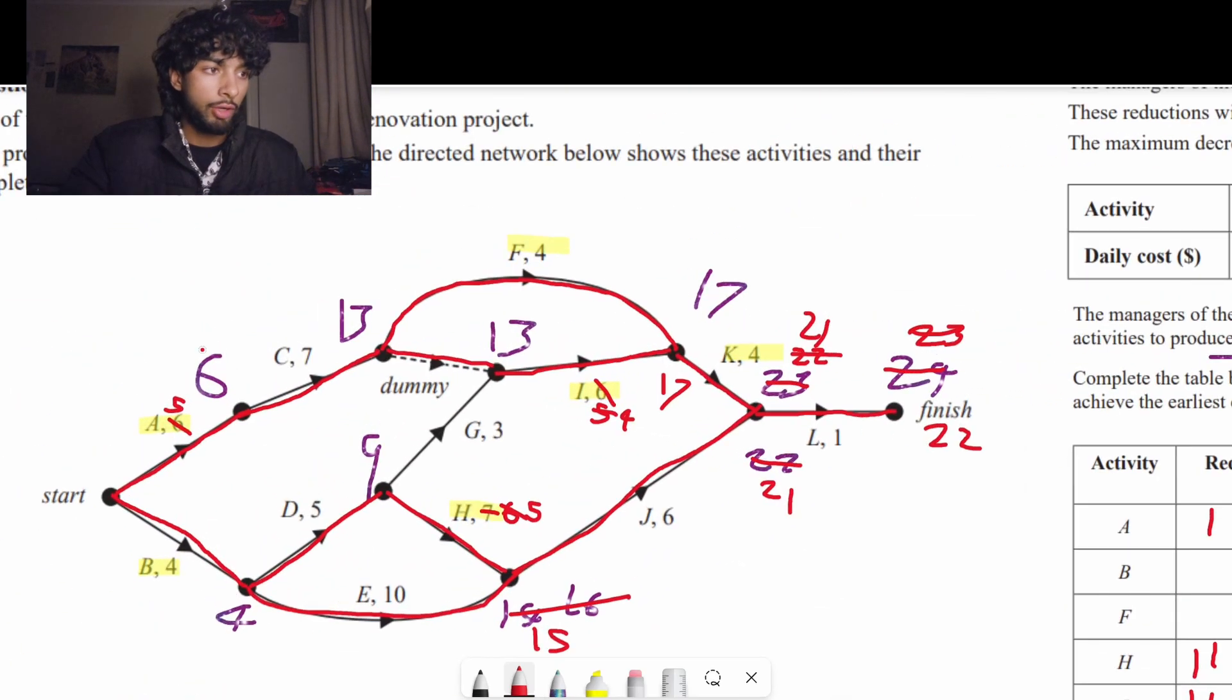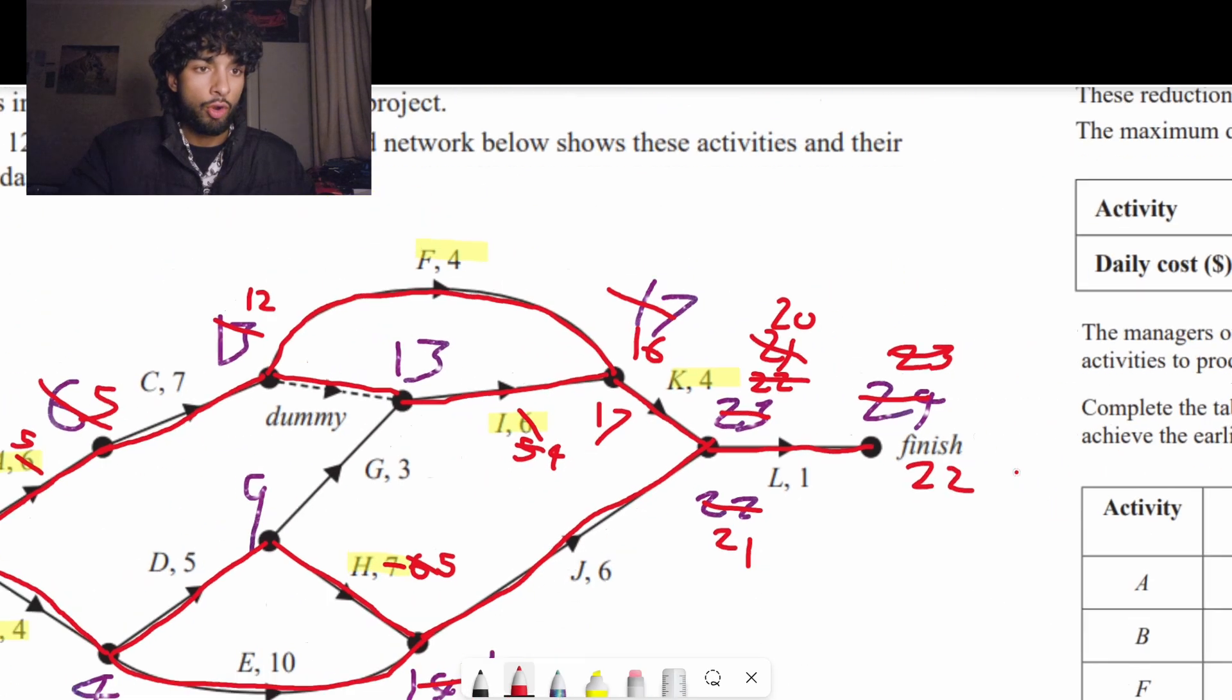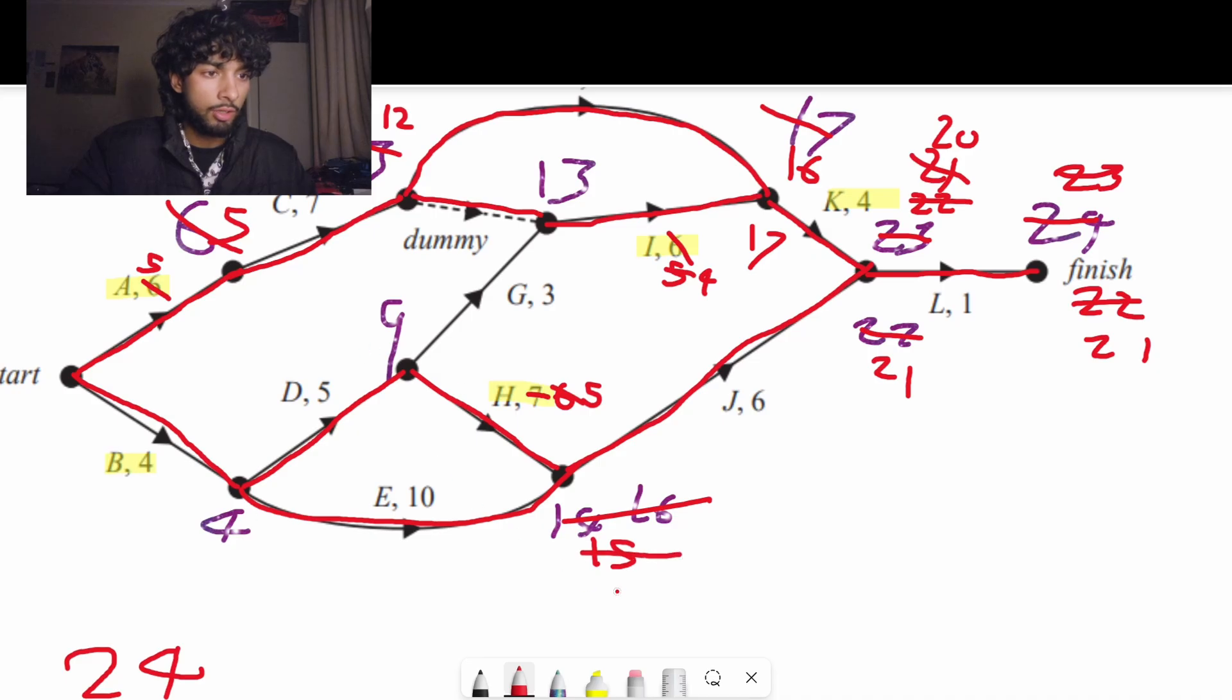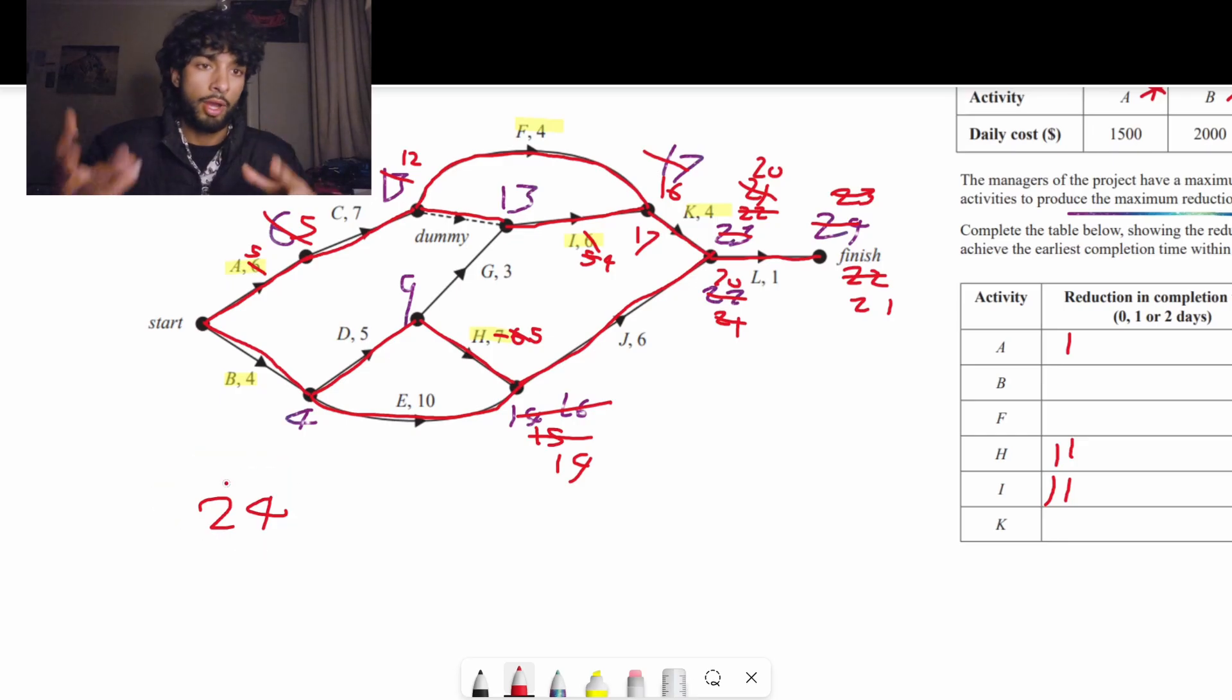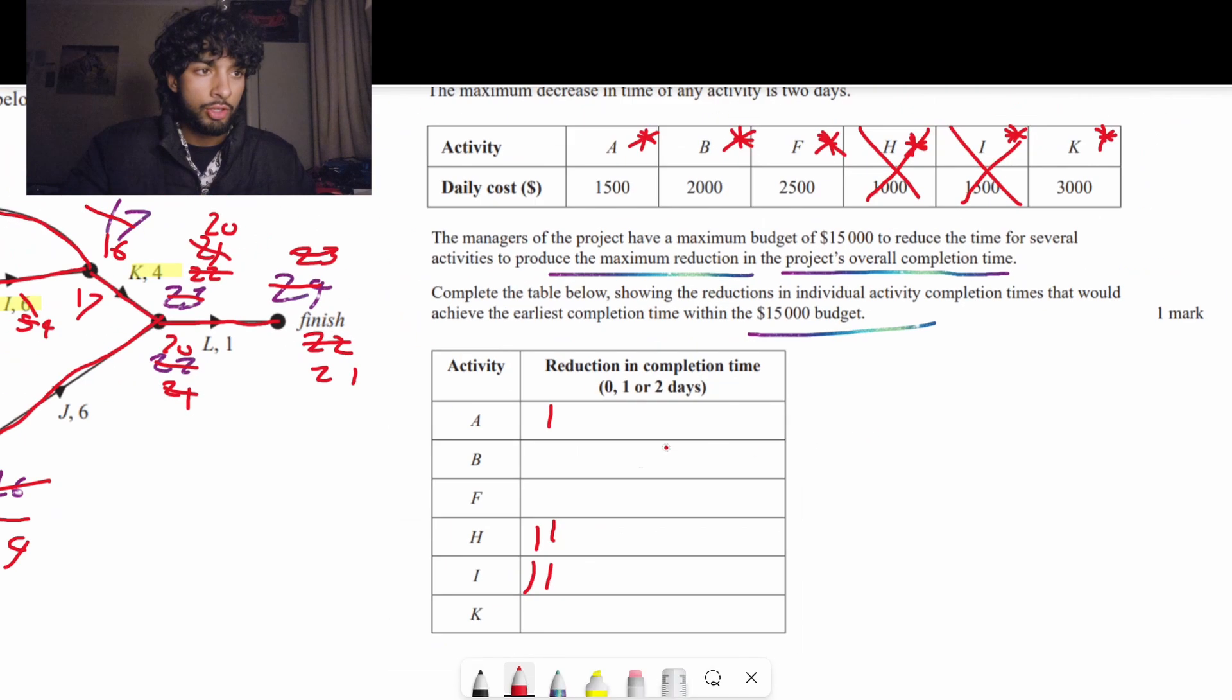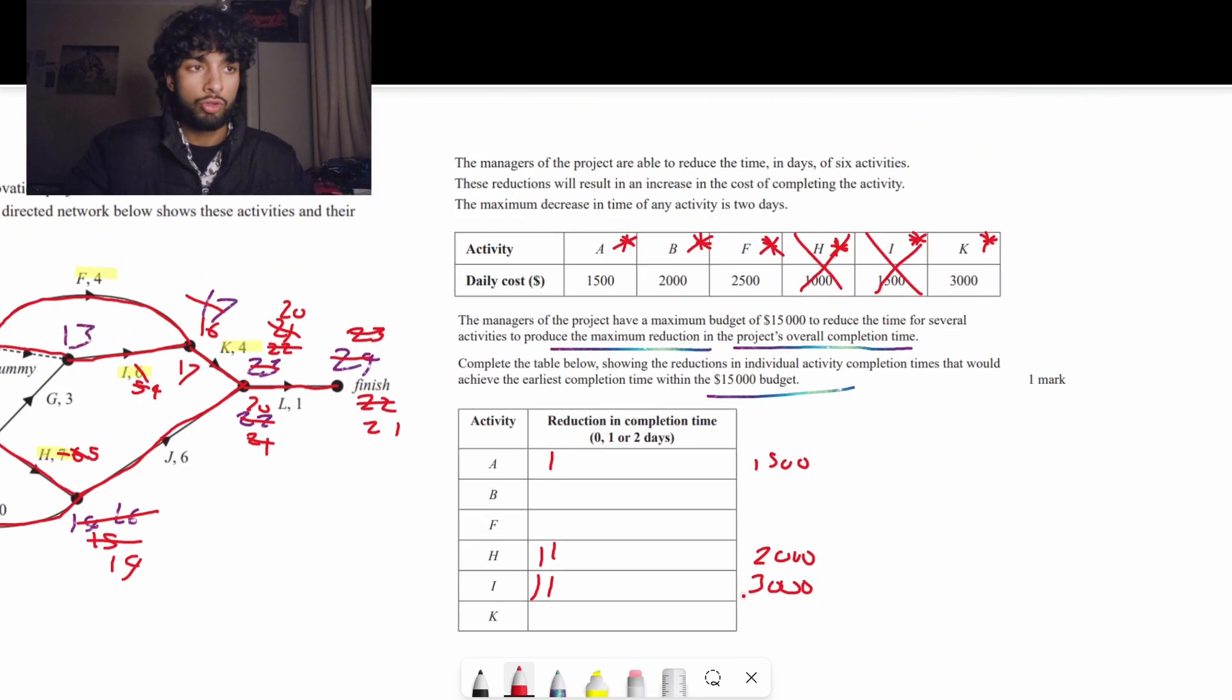Let's recalculate the critical pathways. So if this is 5, that means this is 5 plus 7 is 12. And then 12 plus these 4s are 16. 16 plus 4 is 20. That means the overall completion time is 21. But we'll double check with the bottom pathway as well. 5 plus 5 is 10, so this is 14, and then going up here is 20. So we started at 24 and we've already reduced the overall completion time by three.